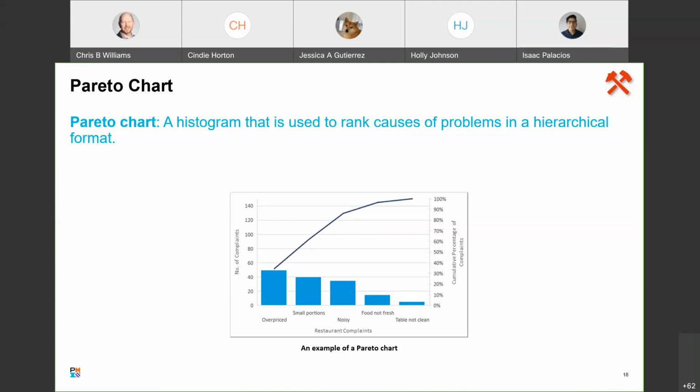A typical Pareto chart is used to represent data, which you first organize in descending order of occurrences, and then you plot the cumulative curve. The bars represent the number of failures for each of the causes, A through E. In this example, approximately 72% of the total number of failures are due to causes A and B, 320 out of 440. The project team can easily see from this chart that they should focus most of their corrective actions and efforts on those two causes.